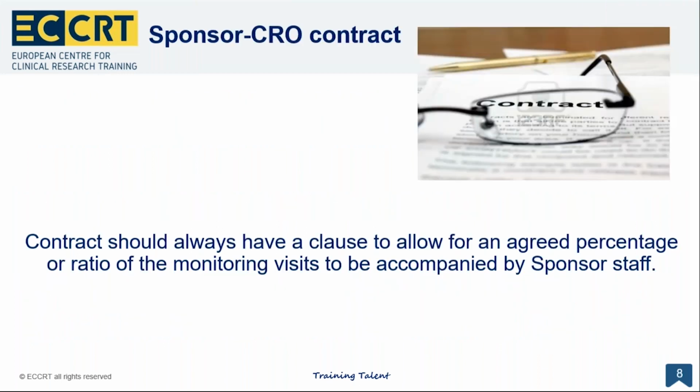Okay, so moving forward. When you are writing your contract between the sponsor and the CRO, it is advisable that your contract always has a clause to allow for an agreed percentage of the ratio of monitoring visits to be accompanied by the sponsor. It can, of course, be further elucidated and specified by verbal agreements and by your more trial-specific co-monitoring plan.